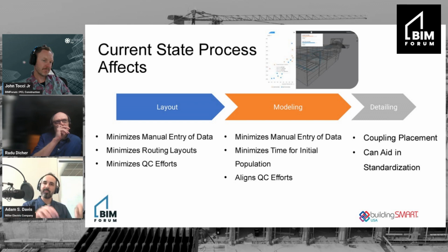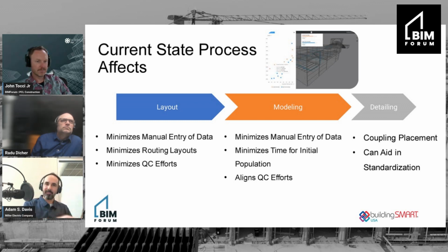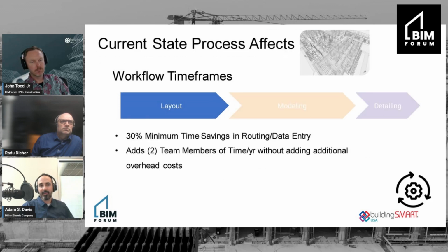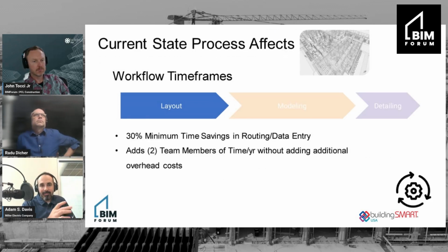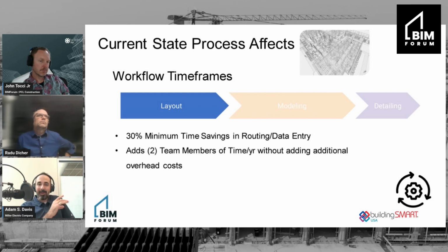And that was all: move it, check the length of the runs, rebid it, rebudget it, send it back out, move it, check the length of the runs, rebudget it, send it back out, and start to look at these scenarios. With a tool like this, we just move everything where we would want, rerun scenarios, look at that magic graph, grab the one we want. And we start being able to iterate really quickly. And I'll get into more of how we did that. So I hope that answered it. And I won't forget, I have a slide to talk specifically about that.